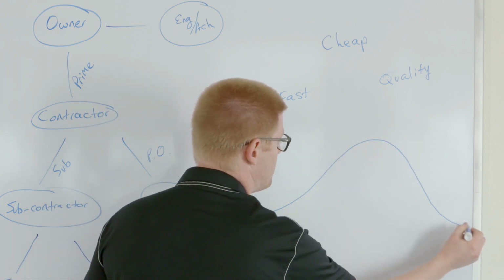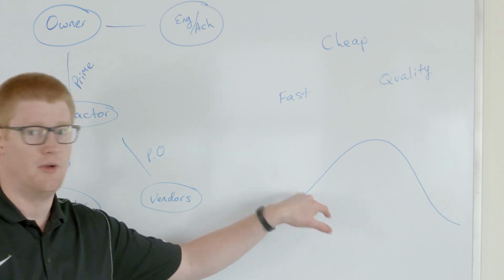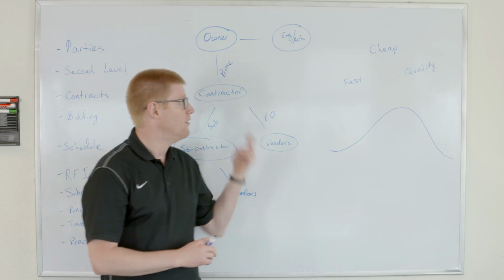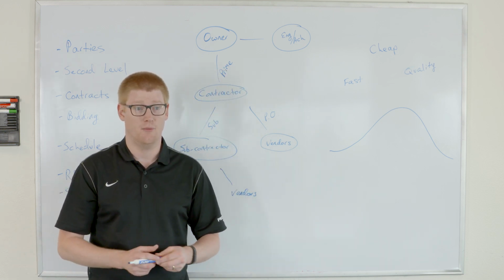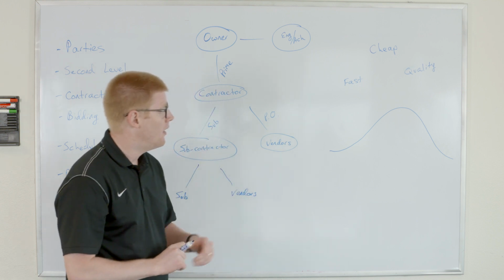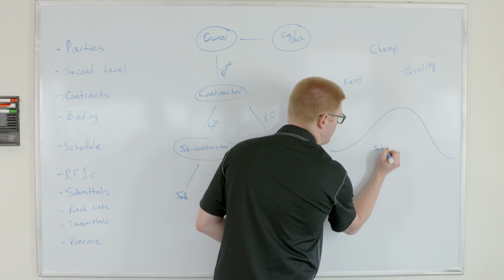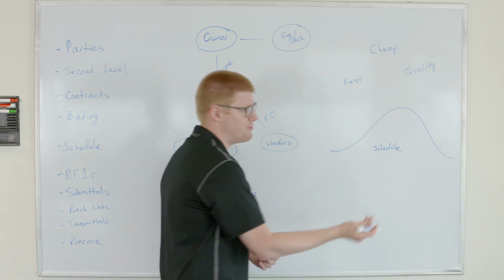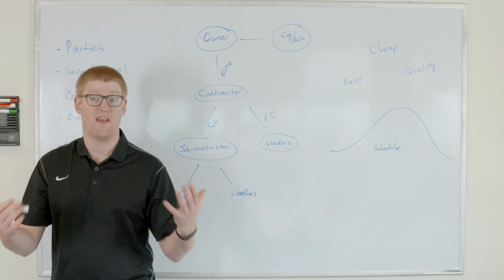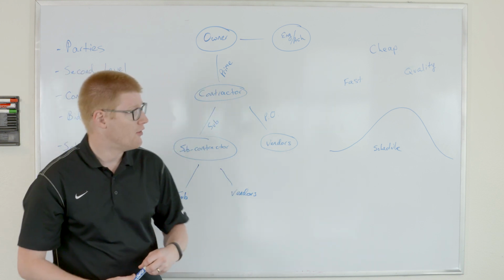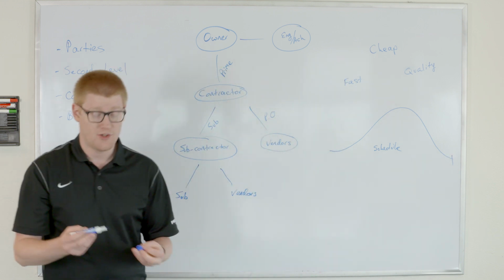In a typical schedule, you're going to see a manpower graph like that, where you're going to hire on staffing, and as you get going, more and more crews come on site. During the peak part of the project, you may have everybody from plumbers to finishers to finish work all going on at the same time. And so you tend to have a bell curve there. And the schedule does many other things as well beyond tracking the manpower on a job site and when things are going to get built. It also allows them to predict when that's going to be finished. The bigger the project, the more it matters.